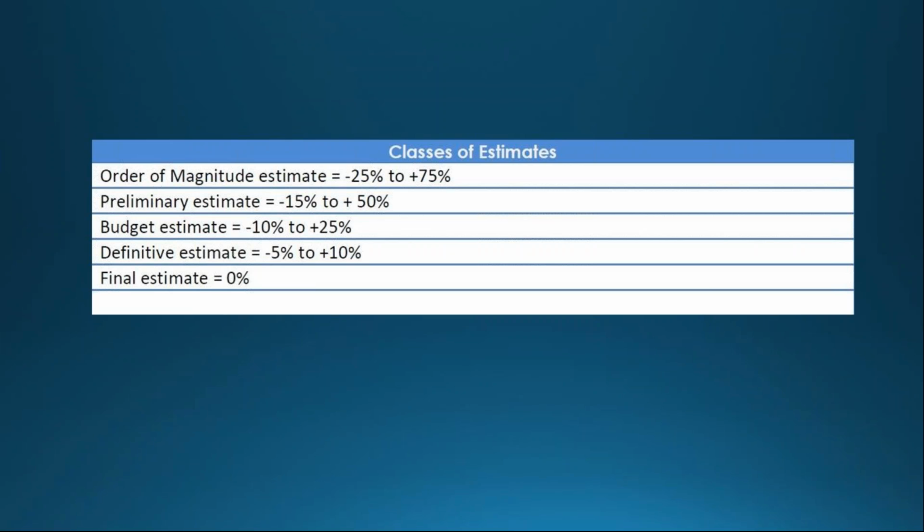At what point is this plan good enough to take into execution? Okay. And I'm saying one of the indicators of that is your estimates of time and cost are coming down closer because they're narrowing. Okay. And to the point where you feel comfortable.